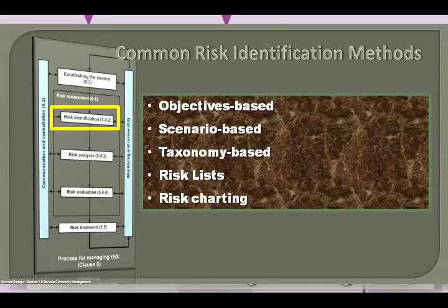One can begin with resources and consider the threats they are exposed to and the consequences of each. Alternatively, one can start with the threats and examine which resources they would affect. Or one can begin with the consequences and determine which combinations of threats and resources would be involved to bring them about.